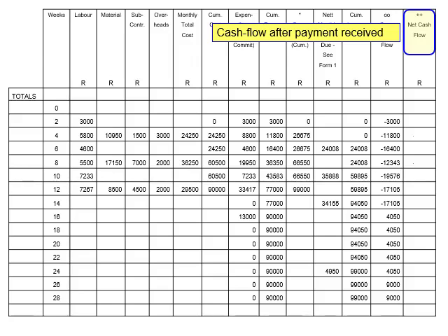Again, let us start with week 2. Go to the cumulative income due column, and select the amount in the current period of week 2. You will find the amount is 0. Then go to the cumulative expenditure column in the current period of week 2. You will find the amount is 3,000 Rand. Now, deduct 3,000 Rand from 0. The result is minus 3,000 Rand. Record the minus 3,000 Rand under the net cash flow column for week 2. Again, do not let the negative amount worry you, as explained earlier.